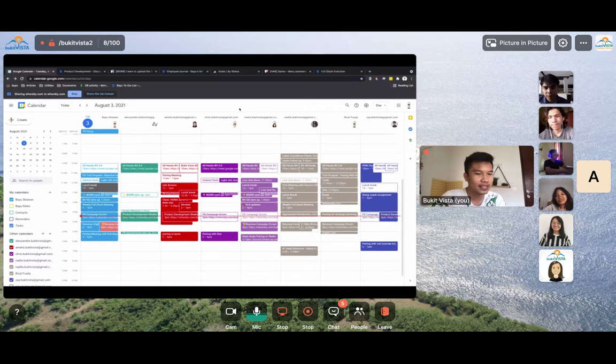So Stefan and Nadia will be handling bugs, but they're not sure whether the developer is actually working on that or not. So we need to have this quick stand up for 15 minutes every day. Can you arrange this event, Zay, and make sure that Nadia and Stefan have the floor basically to get all of the information from the developer? That means everyone in PD will need to attend that stand up and state their pending list, what they're currently working on, and the frictions, right?